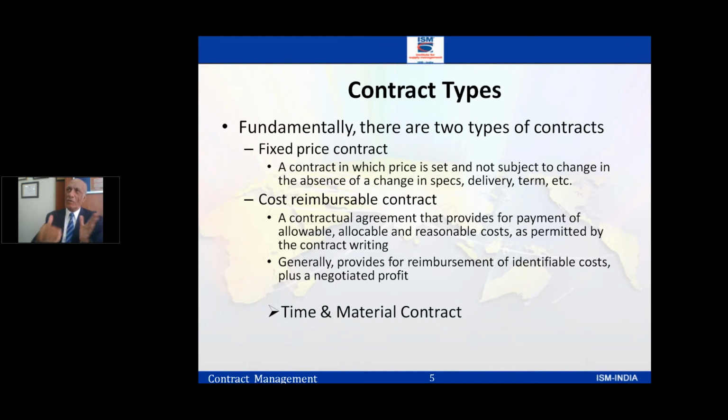Okay guys, whatever you are doing around, this is the fixed cost I will pay. But with this one, depending on the number of days, number of this, I'll reimburse you the cost. I give some organization R&D work to do for me. The guy is not able to define how much time, how many resources. He said, guys, okay, go ahead, do it. We'll reimburse it. But the combination of the two is called time and material.